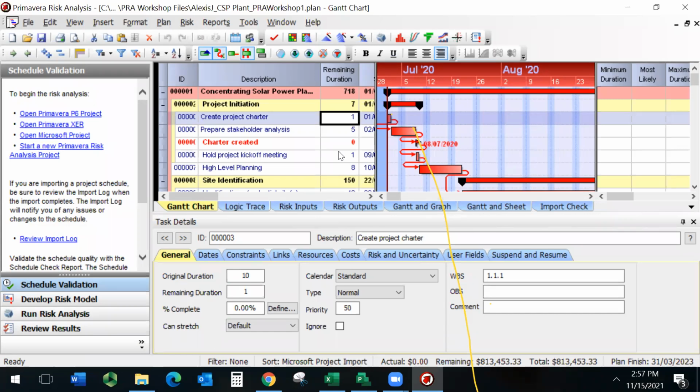Now, sometimes you could use a range estimate, in other words, give 2 values. It may take 1 day or 3 days, and anything in between. That's called a uniform distribution, but we're not going to use a uniform distribution. We're going to use the triangular distribution here.